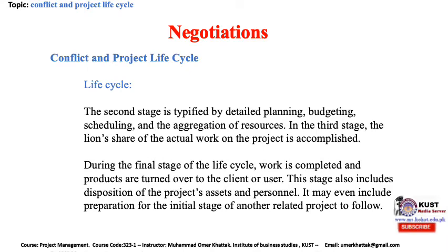During the final stage of the life cycle, work is completed and products are turned over to the client or user. This stage also includes disposition of the project's assets and personnel. It may even include preparation for the initial stage of another related project to follow.